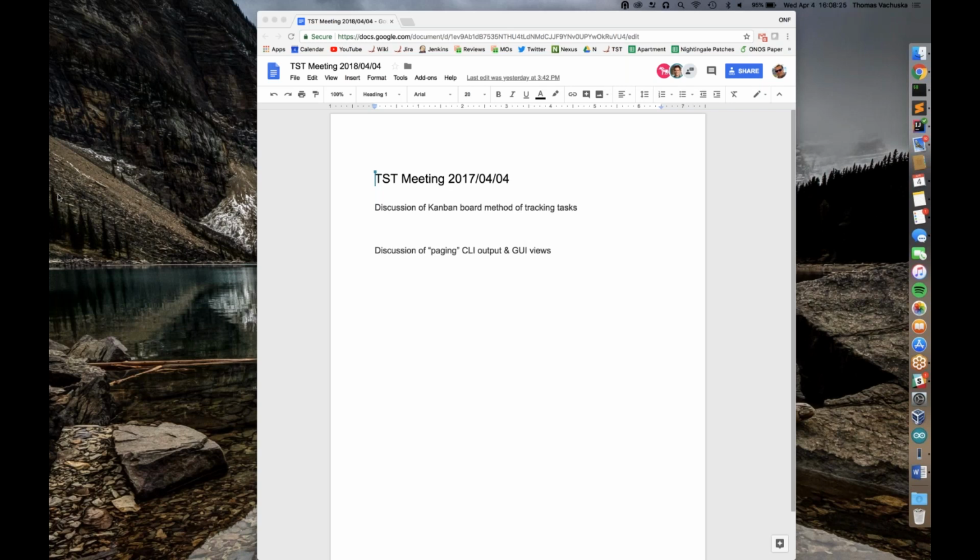Any of the sprint velocity points that we were accruing were largely meaningless because the basis of the Scrum teams is kind of mutable, or it's very, very small, and we're not getting any predictive power based on that, nor can we actually impose some sort of a projected velocity because people contribute in addition to having other obligations. Anyway, long story short, I don't think the sprint process was working well, and so I'm suggesting that we instead use a Jira Kanban board instead of this sprint.